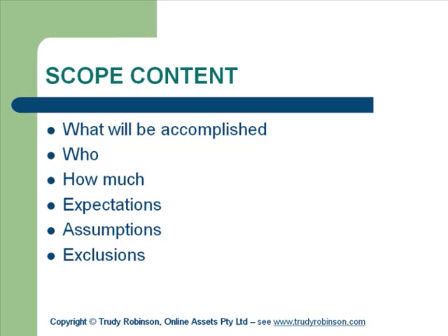So when you're doing, it's a bit different for your project, but if you're doing a business project, for example, reorganising your car parks across the whole of your organisation, you may need to exclude disabled car parking. You may need to specifically state the assumptions are that all car parks will be undercover. There will be no open-air car parks. You may need to state that you're not going to cater for the lazy axle, eight-wheeler, blah, blah vehicle. So this is actually part of putting boundaries around what you are going to include and what you're not.